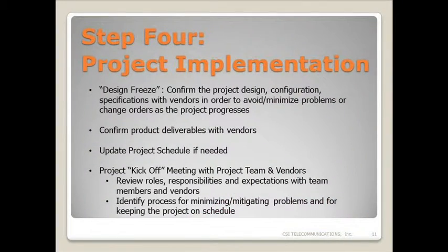Bill kind of touched on design freeze a little bit already, and this is, again, one of those bullet points in managing project creep. If you've got everybody on board from the front end and the get-go of, this is what we're doing, this is what the design is going to look like, you can avoid, minimize, or mitigate change orders down the road, which often can be costly. You can avoid miscommunications of what the expectations were, both from your stakeholders and from vendors. You can make the project go so much smoother. So trying to get as much clarification and finality at the front end of what the design and the basis of the project is going to go a long way for you.